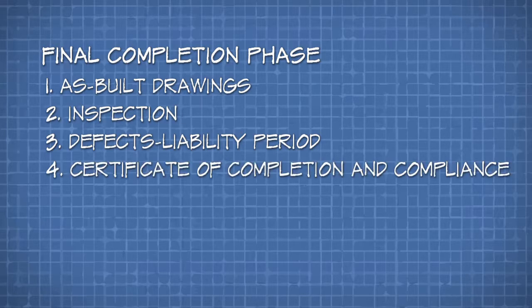The certificate of completion and compliance is issued by the architect. The quantity surveyor finally completes the final accounts and revises the bills of quantities, and the client releases the retention payment to the contractor. That being said,